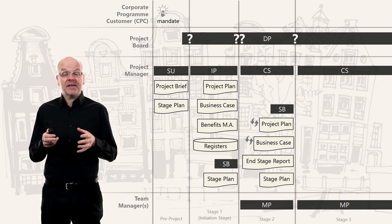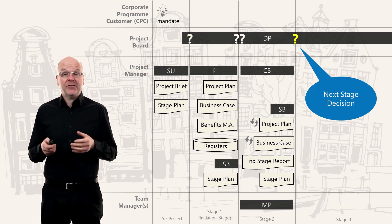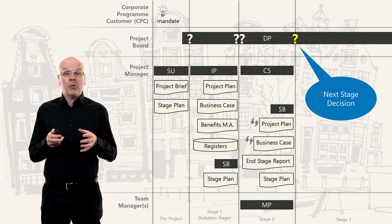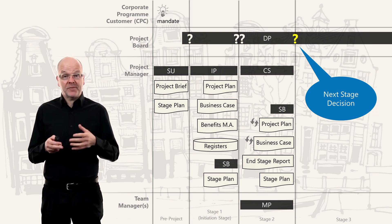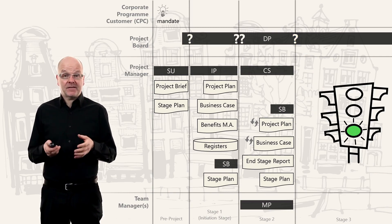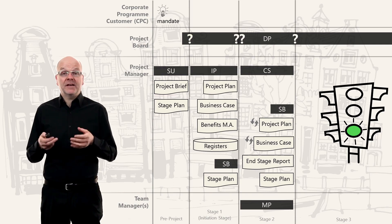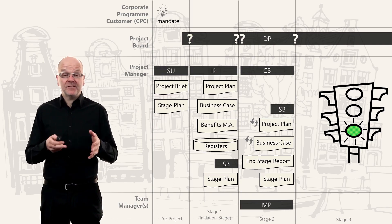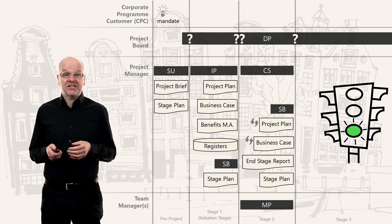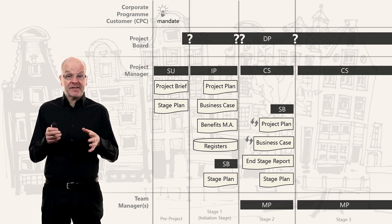We have just finished stage two and we are asking the project board to allow us to continue on to the next stage, so they have to make their next decision. The project board reviewed the documents from the stage boundary process and said yes — this decision is called 'Authorize a Stage.'